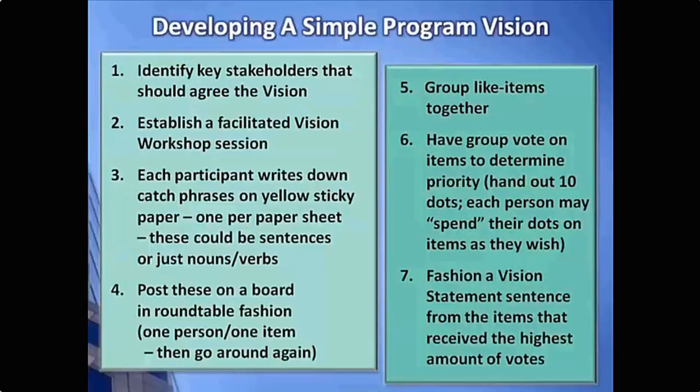So this is just a general way to get started. It allows you to get a vision together within 1 to 2 workshops. And again, don't spend a ton of time on this. I want to caution some efforts where I've seen literally months go by while people are arguing about the vision. Get the right stakeholders in the room, have an organized way of just getting things down on paper, on the board, and then eventually crafting a statement, and then we'll be able to move on from there. But this is just a simple approach that you can use to get that started.